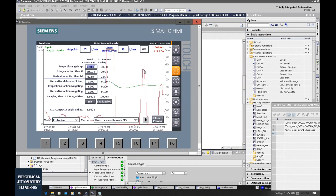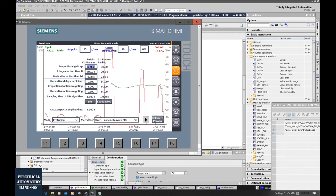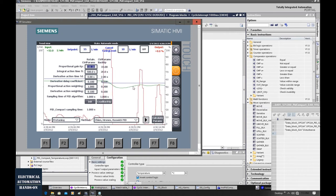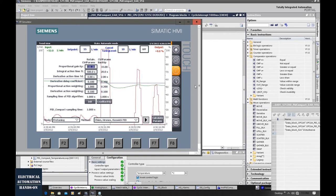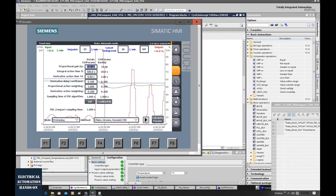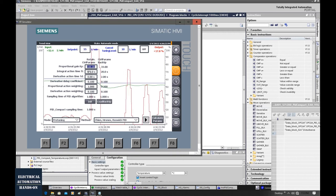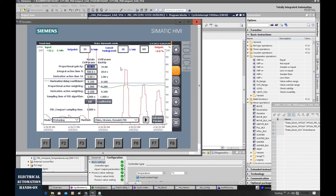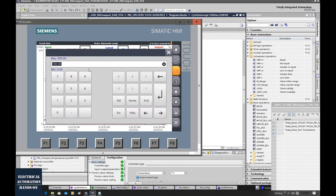Okay. This is the first time and this is the second time — there is oscillation here, but this output is still ramping down. That means this gain is still not big enough. So let me increase it to 140.